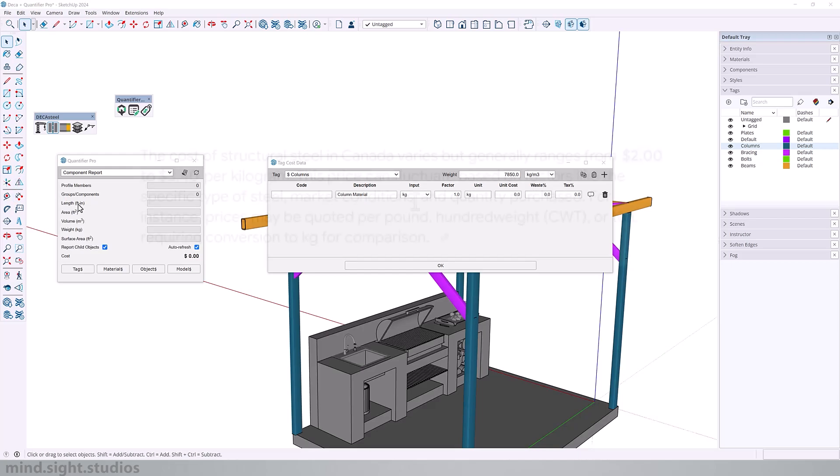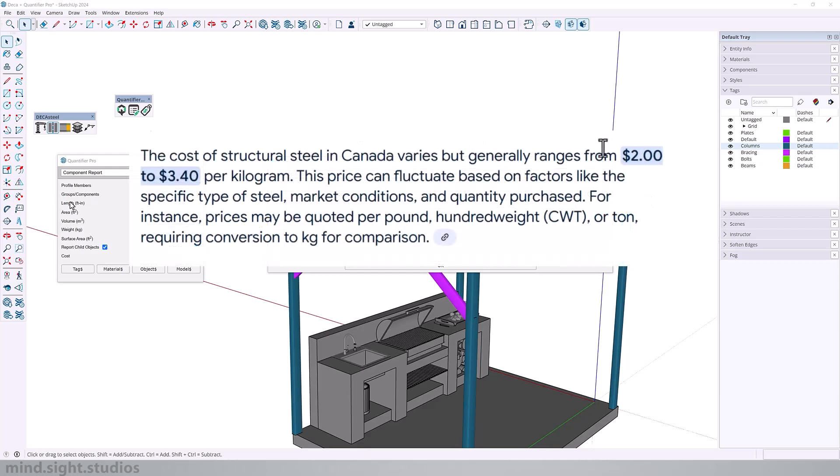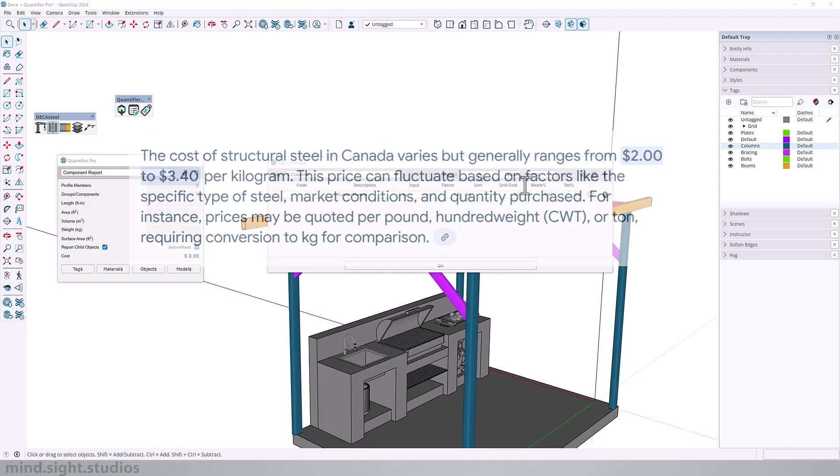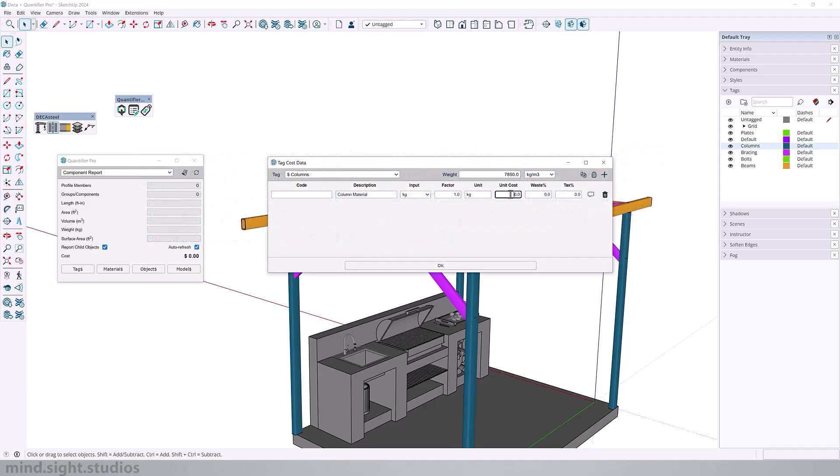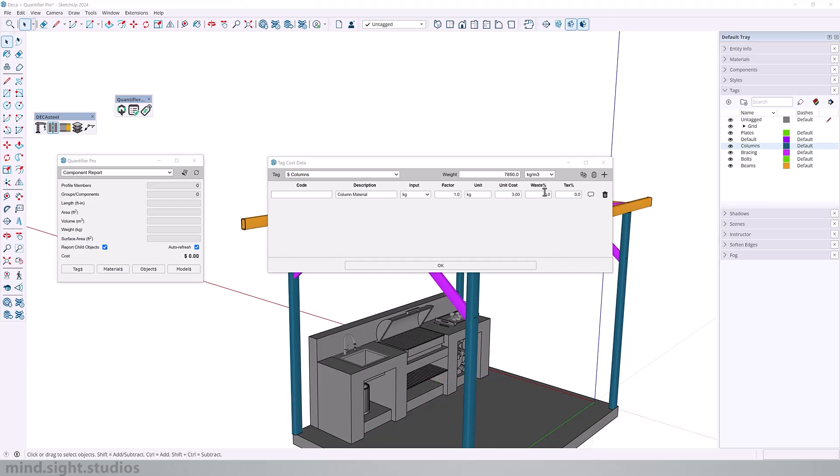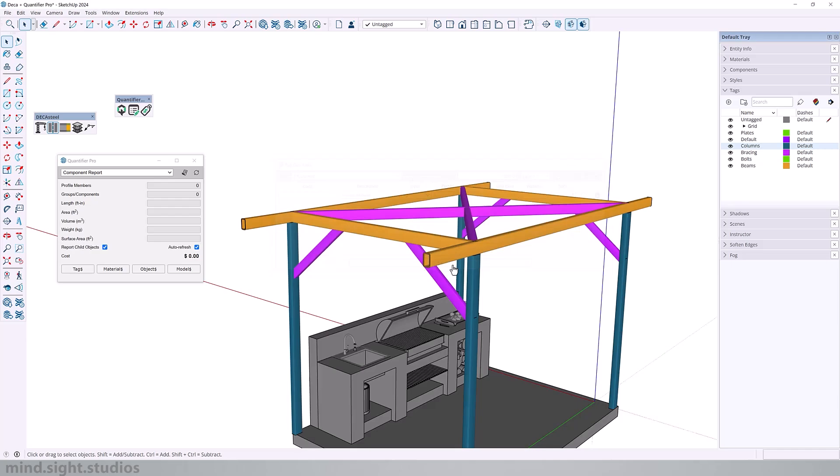And we'll use Ascanda for an example. So this falls somewhere between $2 to $3.40. So to keep it simple, I'm going to keep it to $3. Waste is a percentage of the price that takes care of losses when you cut, bend, and handle the steel. So we can assume 5%. And for the taxes, we can assume 12%. So I'm using these values for example, so please cross reference this with real values, depending on where you live. And with that, we can hit OK.